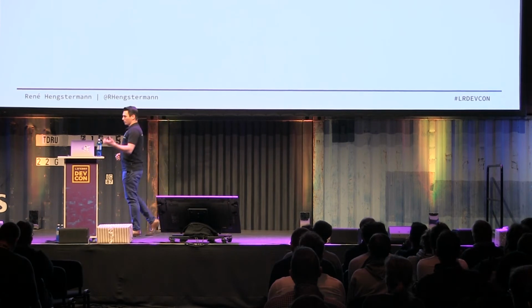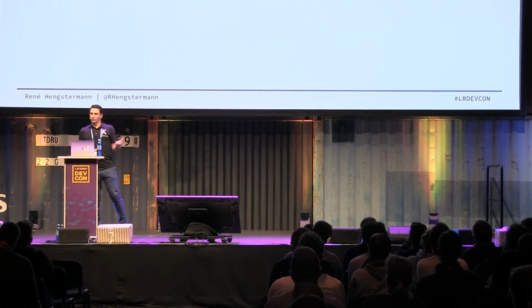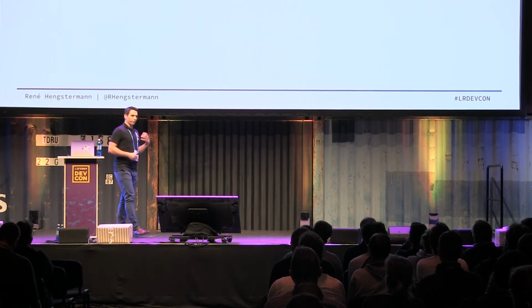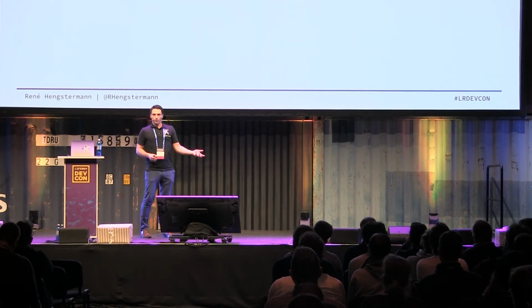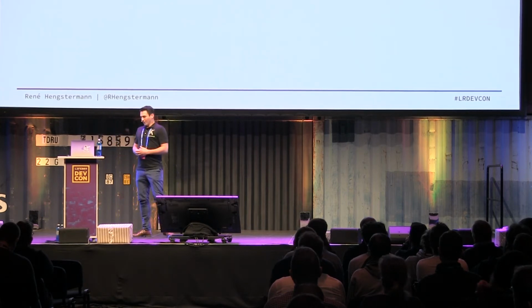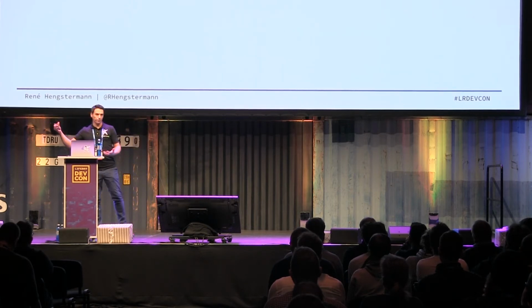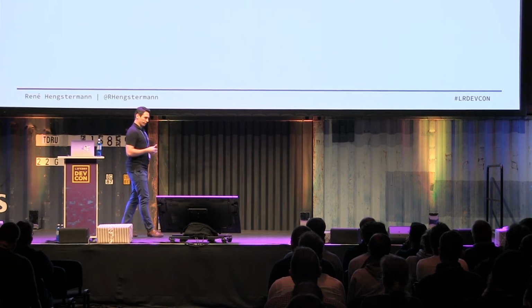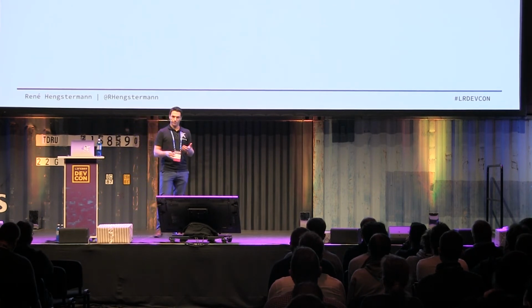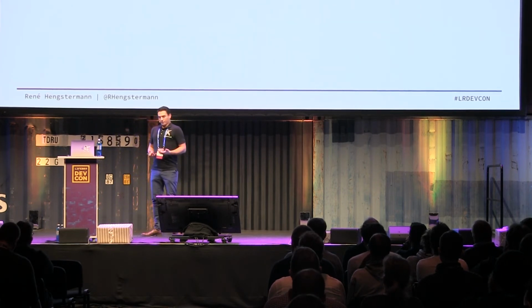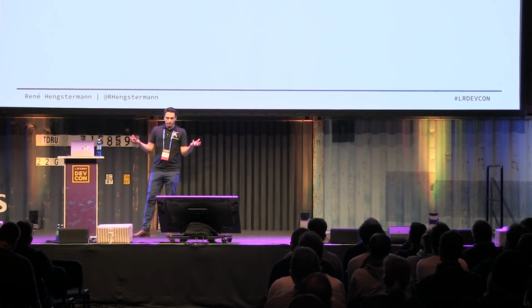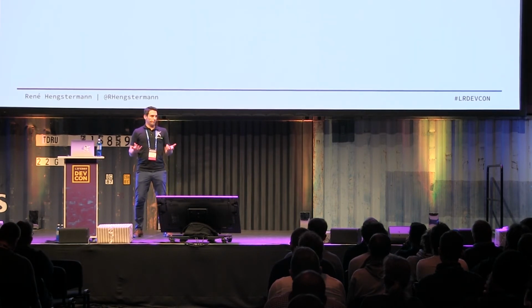Then we wanted to use Liferay 7.1 because we wanted to use some features in Liferay 7.1, for example, the advanced forms and also the fragments. So what to do? On the one hand, we need to really push the functionalities of the platform, and on the other hand, we want to migrate to 7.1, which is usually a stop in the development activities. So we decided to split up our code base and also our development team.